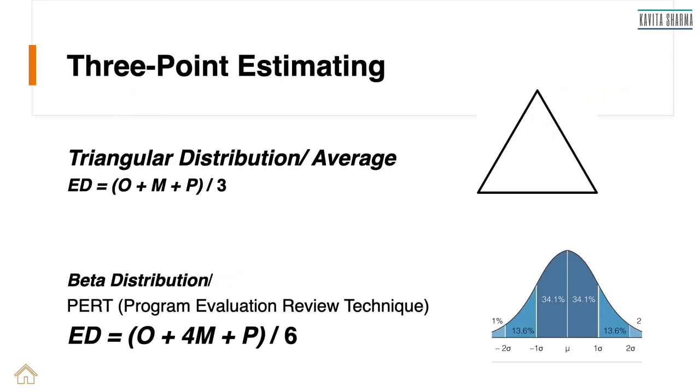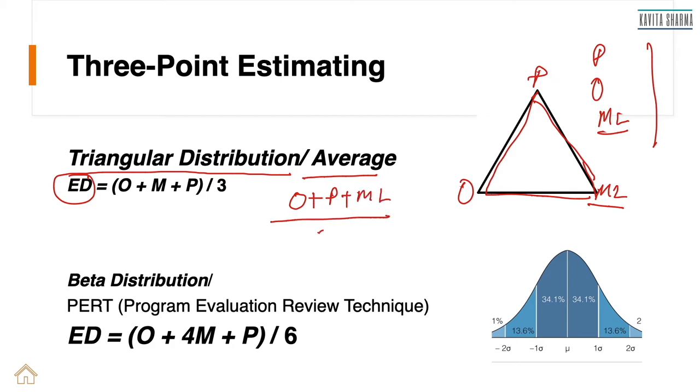The next one is three point estimate. These are, what are those estimates? We had pessimistic, we had optimistic and we had most likely. Now these are three point estimate. To arrive at expected duration or one estimate, it's called expected duration or expected cost. We can use two formulas. The first formula is triangular distribution or also called average distribution. What is it? Look at this triangle. We have, this is pessimistic, this is optimistic and this is most likely. Now to arrive at a formula, it's very simple. We say optimistic plus pessimistic plus most likely divided by three. And I arrive at the expected duration or expected cost.